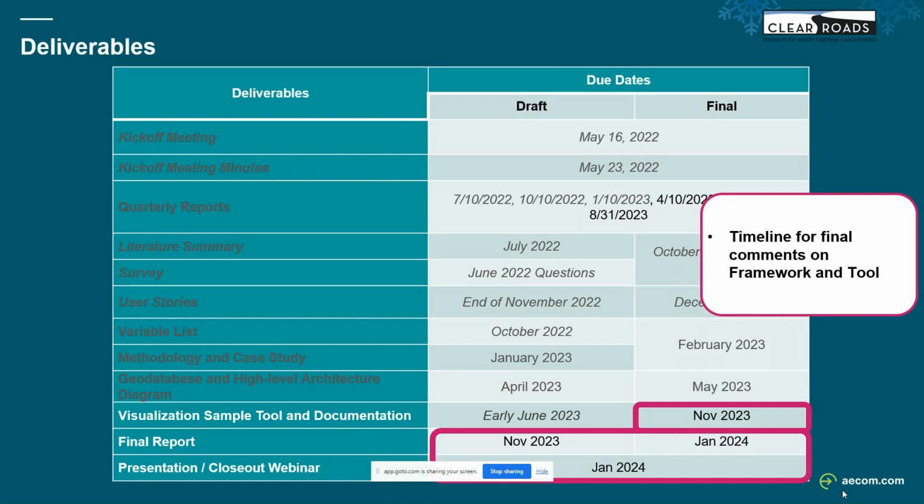Yeah. And like you said earlier, we've got the time in the contract. So I think what we should do, because there's no change of contract end date, is submit a quote unquote letter to file, which is simply the amendment with a revised task schedule, just so MnDOT knows when to expect the various deliverables. It doesn't need to be approved. It simply needs to be logged with MnDOT, and then they have it for the records. So I'll work with you guys on that. And Tom just gave us a thumbs up. So we can do that.